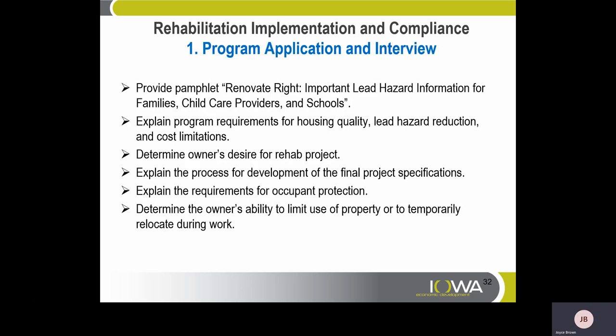Step one — program application and interview. Must provide the pamphlet 'Renovate Right: Important Lead Hazard Information for Families, Child Care Providers, and Schools.' Explain program requirements for housing quality, lead hazard reduction, and cost limitations. Determine the owner's desire for the rehab project. Explain the process for development of final project specifications. Explain requirements for occupant protection. And determine the owner's ability to limit use of the property or temporarily relocate during work.